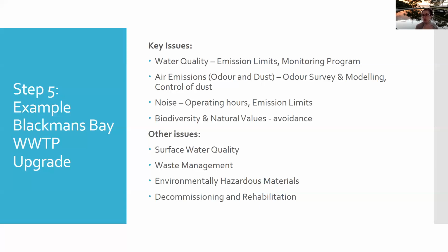So even though the Blackmans Bay treatment plant is designed to operate 24 hours, 7 days a week for as long as it can, which may be 30, 40, 50 years, we had to ask them what they were going to do if they had to shut it down, and how they would rehabilitate the land. The same for the quarries, the same for any development, because you only get one crack at the environmental assessment. Then the regulatory system takes over, and they would probably have to do a decommissioning and rehabilitation plan at the end of life. And EPA would manage that decommissioning and rehabilitation, including any demolition of buildings,